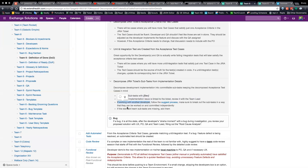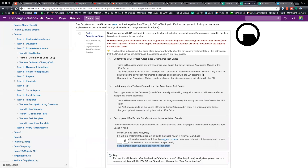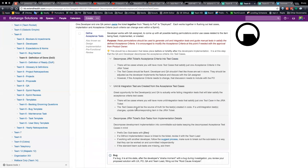If working with another developer — this comes from me working with Mike — it's important that these subtasks are decomposed in a way that they can be worked on in parallel and also committed in parallel. Try to be creative in how you write them so that one developer can work in one piece of the code, commit it, and not cause a big merging issue with the other developer. Make sure to break out the subtasks in a way that they can be worked on and committed independently. This session is where you get together, first create the test cases, review with the QA, come up with what you need to test, and if you want to be even more disciplined, create those failing tests right then and there with that QA person using TDD — write failing tests first before you do anything.